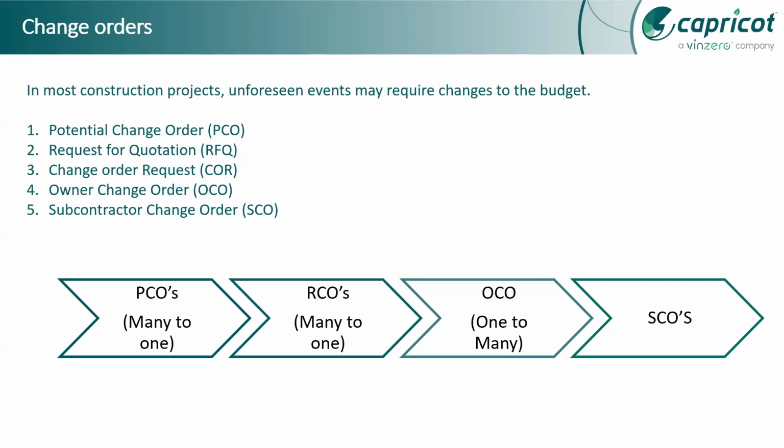And for that, we need to get the quotation from our different vendors, right? And those can be requested for quotations from, let's say, our procurement team. So they will give us the cost for that, and from that we will select one. We will either select or reject one, and then we will send it further for the change order request to our owner or our subcontractor, right?